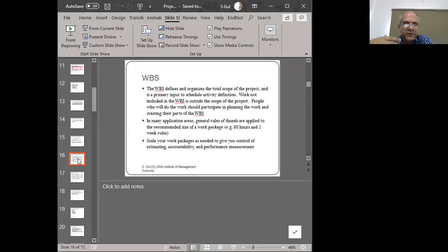One is that you can actually go through the motions of decomposing an activity into smaller pieces, or if you have previous experience, then you can rely on things like heuristics, which are rules of thumb. And if you have a certain heuristic available, then please do use it because it makes your life much easier. Heuristics such as, 5 people are needed in order to do 60 hours of work in 3 days, I suppose, right?